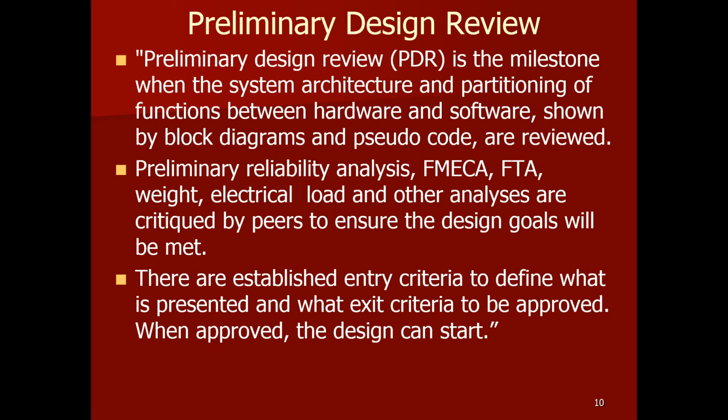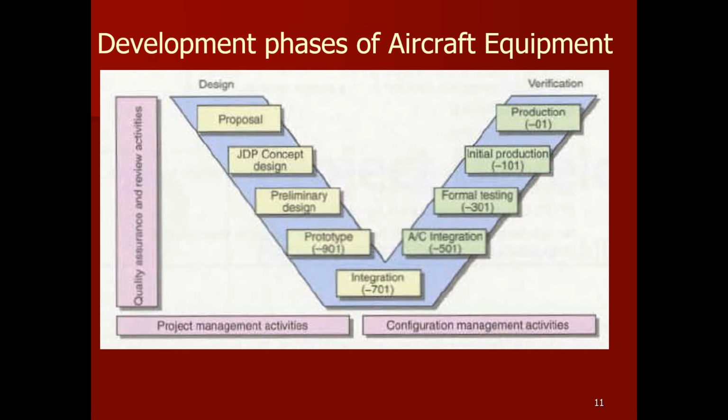So basically, we lay out our plans and we make sure they're feasible. There are established entry criteria to define what is presented and exit criteria to be approved. So we know what we want, and we've got some clear plans. When that's approved, the design can start.